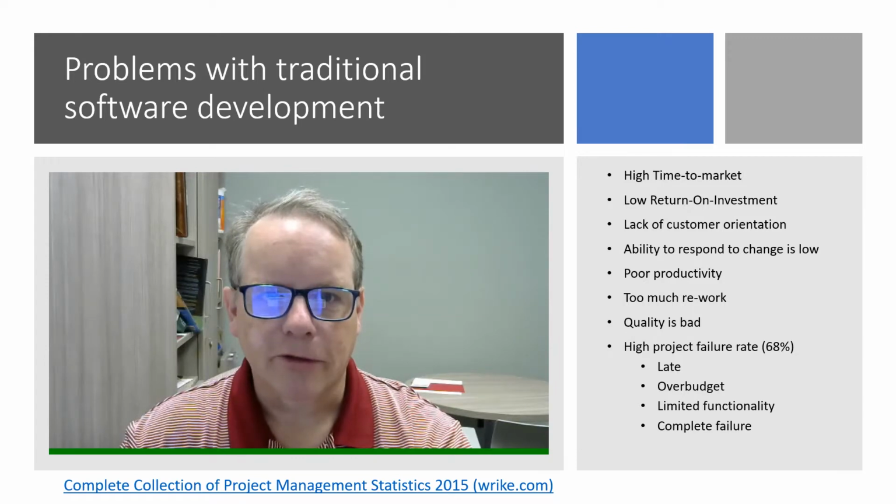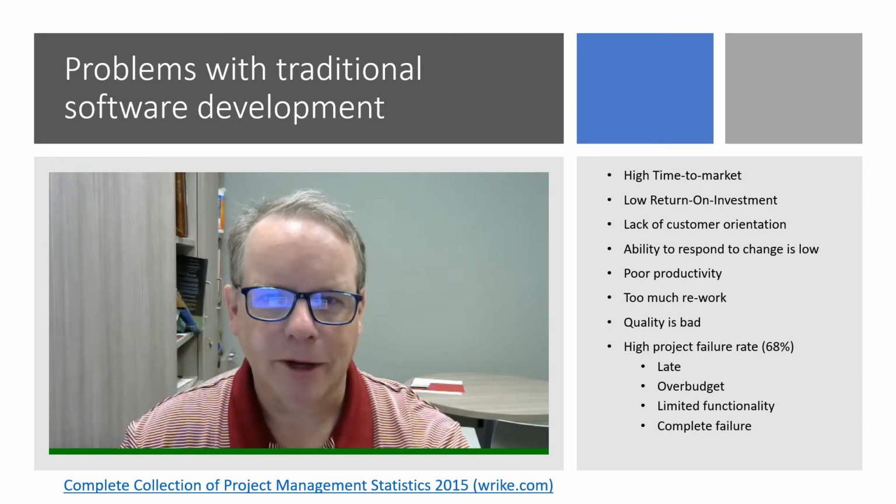Just to get a sense of the issue, the failure rate of large projects, that is, we're talking about projects costing $10 million or more, is just astonishing. In all, software projects have a high failure rate, where only 64% of the projects meet their goals. On average, a large IT project runs 45% over budget, 7% over time, and delivers 56% less value than expected.